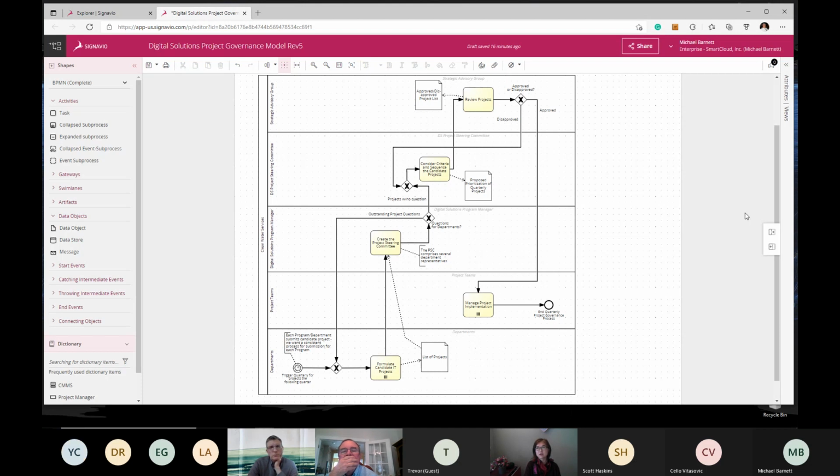Another question you have is ongoing projects. So what the plan is, Digital Solutions will continue doing a lot of the keep-the-lights-on foundational work, like patching and maintenance. Those resource capacities are already allocated, let's say 30% of the time, for those foundational items. This sequencing model only applies to the strategic or aspirational or operational things. It's nice to have, and then we'll go through the sequencing model.